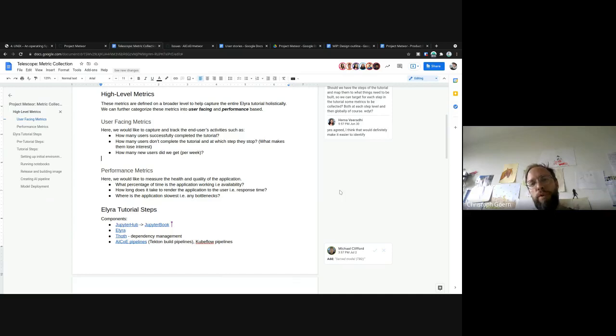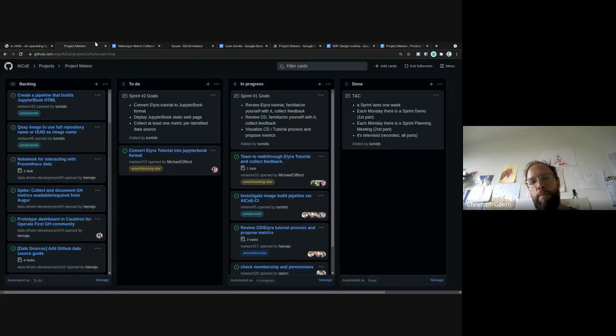The role is more a technical term. We implement something like the storage administrator role in OpenShift, and we're gonna grant it access. So we have that role-based access control configured, technical stuff. But if you're talking about product planning, you're talking about that category of user stories that you can cluster together, which are all targeting the same person role, and that is called persona.